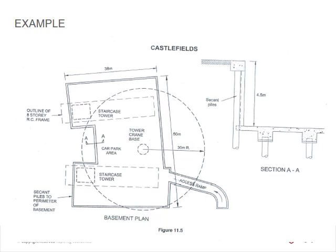The basement excavation takes place between the secant pile wall. Access to the five-meter deep basement is via a proposed access road, and pedestrian access is via scaffolding access towers. The volume of excavation material is approximately 9,800 cubic meters. The program duration for works is 20 days — from this they calculate they need approximately 25 truck loads per day.